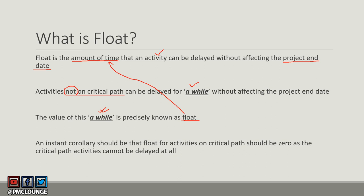A corollary here is that float for activities on the critical path will be zero, because critical path activities cannot be delayed at all — that's the whole concept of critical path. Activities on other paths can be delayed for a while, and that amount of time is known as float.